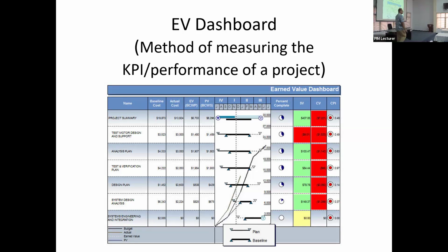So you may even finish the project on time, but at a higher cost. How is that possible? How does a project finish on time, but your cost is high? What have you done to it? You have put in a lot of resources, right? You have accelerated. So your cost goes up. Always remember the triangle: time, cost, quality. Your cost goes up because you are trying to finish faster.